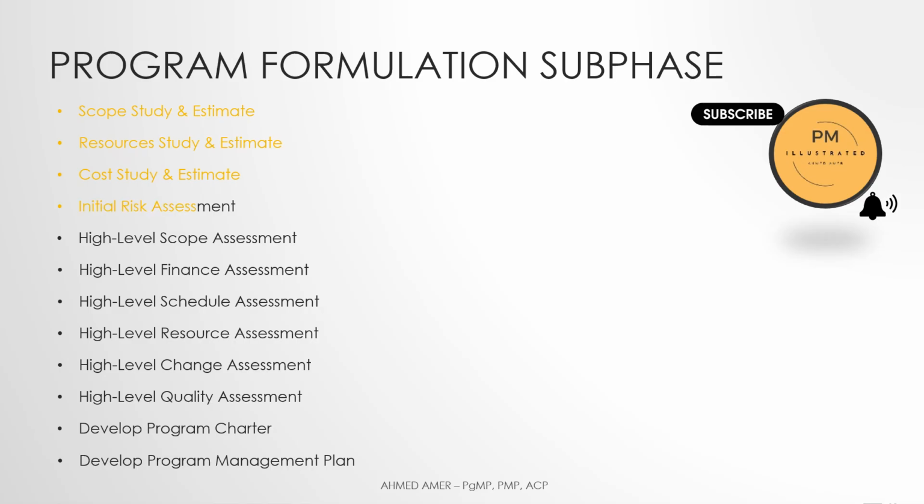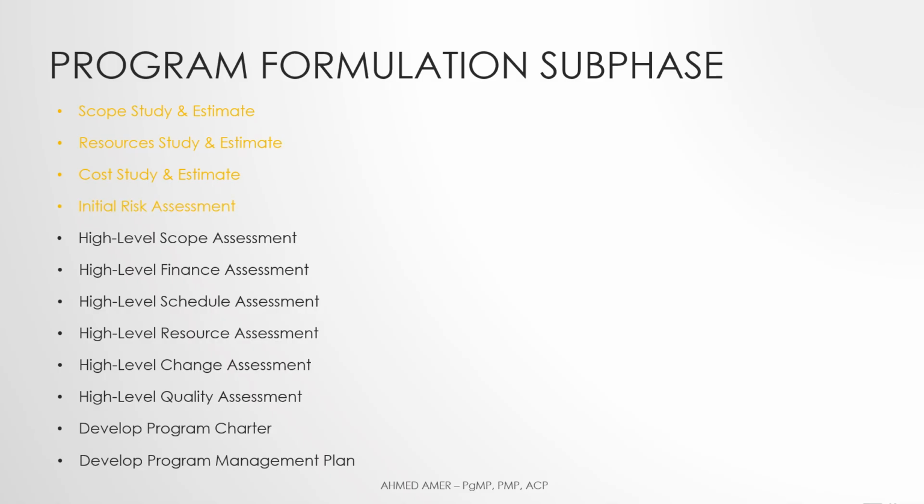The initial risk assessment is conducted to analyze threats and opportunities. This analysis helps the program team to determine the probability of the program's successful delivery of its planned benefits and identify risk response strategies and response plans.